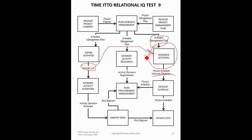So the activity list, the activity attributes, the milestone list, they all go in here. And this is where you would use PDM, precedence diagramming method. You would also use dependency determination and leads and lags as tools and techniques of sequence activities.